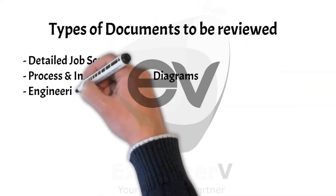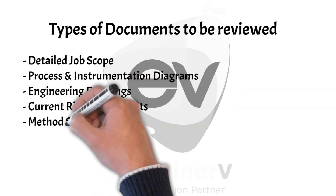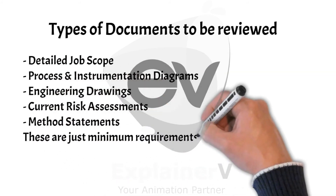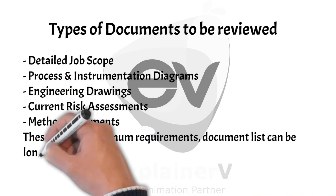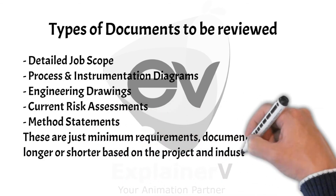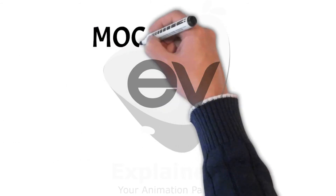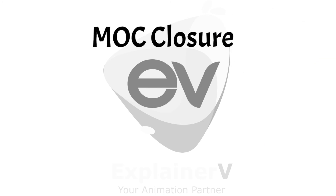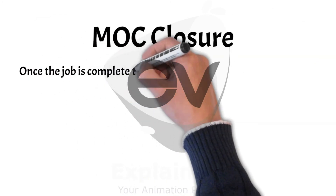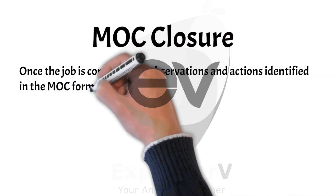The list of documents to be reviewed can be longer or shorter based on the project and the sensitivity of the industry, but the minimum requirement is the detailed scope of proposed change along with appropriate engineering and process drawings, and the detailed job method statement.